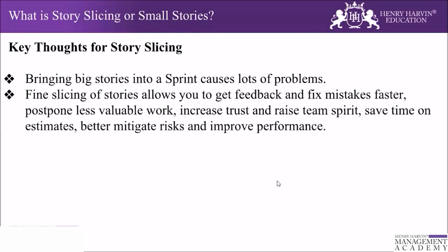So the first thing is that small stories provide focus and a short horizon for the team. It is easier to get lost in the details with a larger story, because there is definitely going to be a lot of discussion while discussing the stories in the planning meeting. If they have a very big story, surprises may come in the later stage, and that actually takes a lot of time to get rid of.